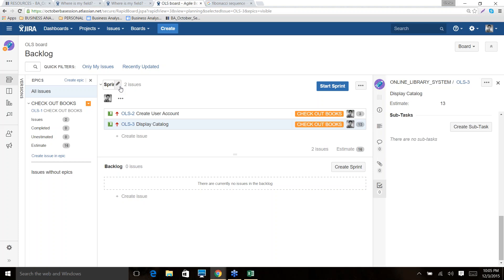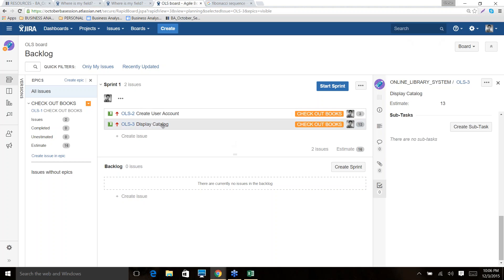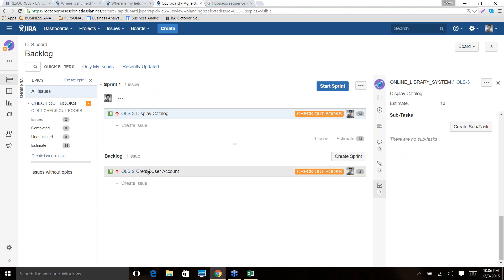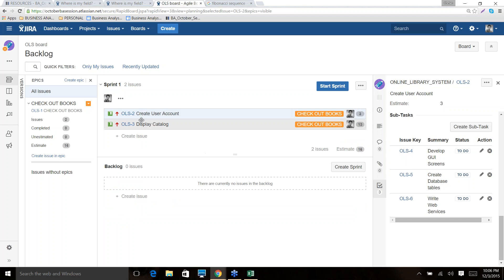Student asks how to get to Create Sprint. You click it and get the new interface. You cannot initiate a sprint without stories in it, so drag your stories into the sprint first. Give the sprint a name — I'll use Sprint One. You need to decide on the sprint duration. Let's say we start on the 7th and end on the 18th — that's a two-week iteration.